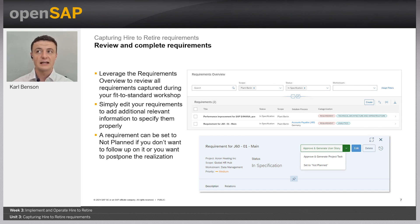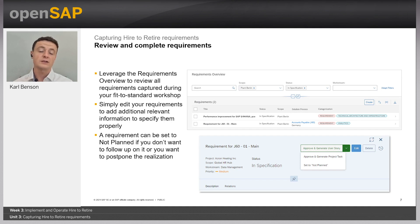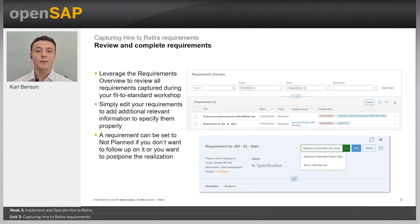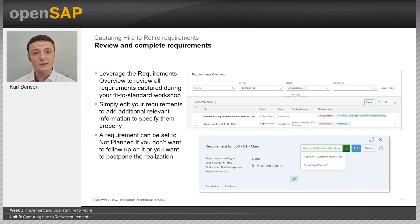Once we've captured requirements with the process relationship stored, the next step is to leverage the requirements overview screen to manage them. Using the available filters, we can narrow down the list and edit requirements to add any additional information not captured in the fit-to-standard workshop. By clicking on and expanding a requirement, we can see the approval flow options: approve and generate a user story, approve and generate a task, or set to not planned if we don't plan to immediately work on that requirement.